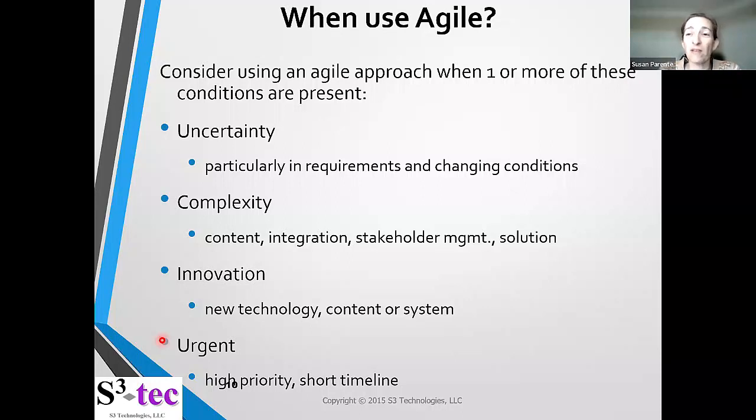So incremental means I take this big project and I break it into pieces. Well, with a 14-week class, I can look at it as 14 pieces. And so what I did is I did the first 2, I think it was at least 2 weeks of class, maybe 3. I developed those before the class went live. And then after the class went live, I continued to do the rest of the development.